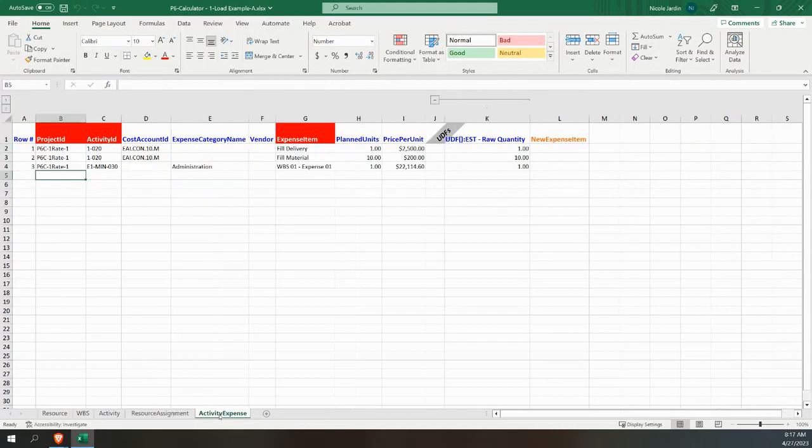And then we may have some items that are not necessarily going to be a resource, okay? And you would, again, have a standard on how you would do that within your organization. So things that are perhaps administrative, things that are costs that don't have to be graphed against a maximum limit. So things like perhaps travel costs would be a good example.